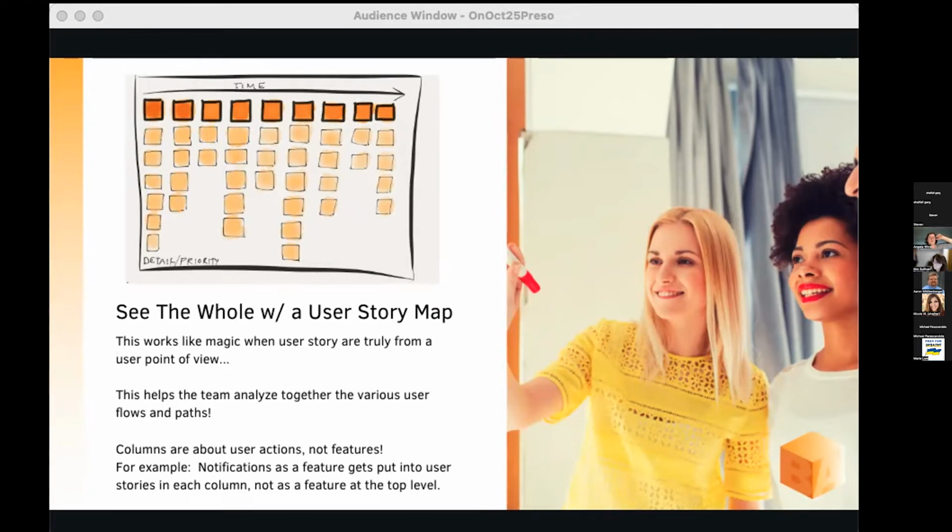So for example, on our story map, we would have something like deliver product. So you buy a used treadmill online, right? And we expect that to be delivered. So underneath deliver product, you might have all kinds of user stories, like user stories about the shipping group or the seller of the product sending it or shipping it, the customer validating address, the customer viewing their status, etc. And maybe we want a user story about the customer receiving a notification that it has arrived on their doorstep.